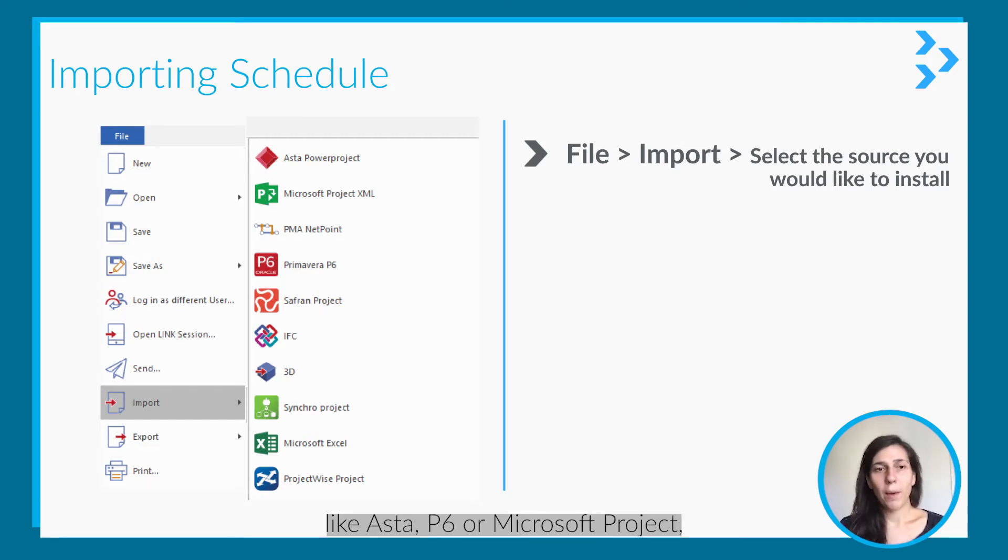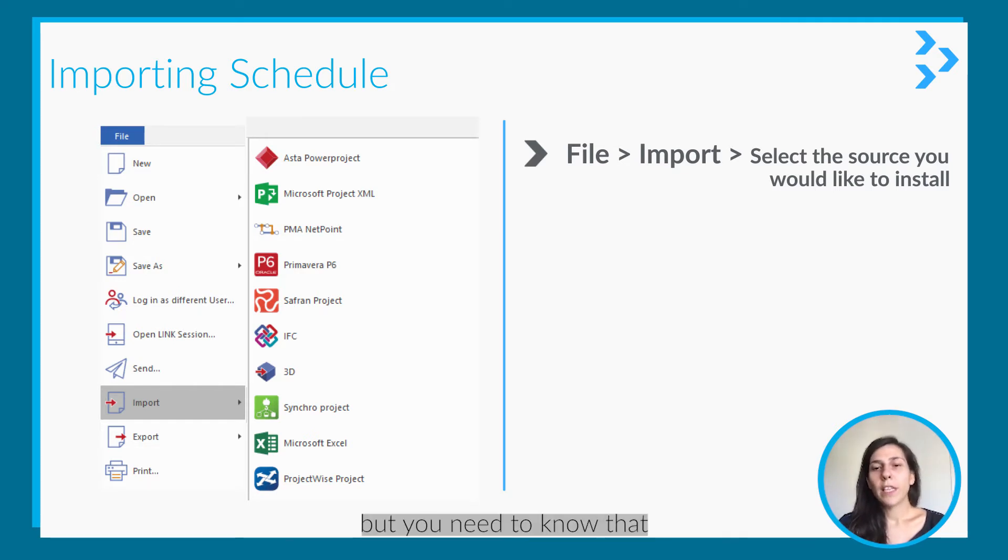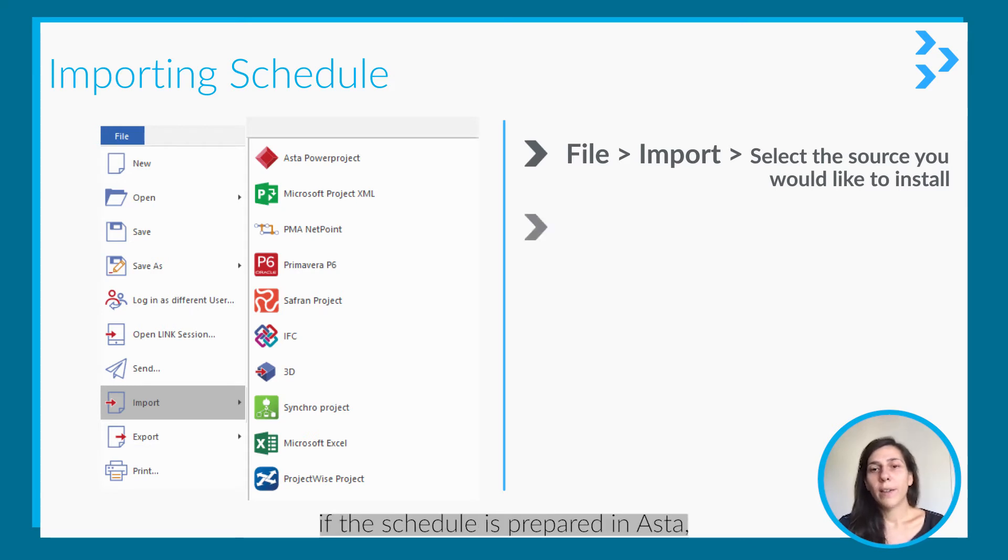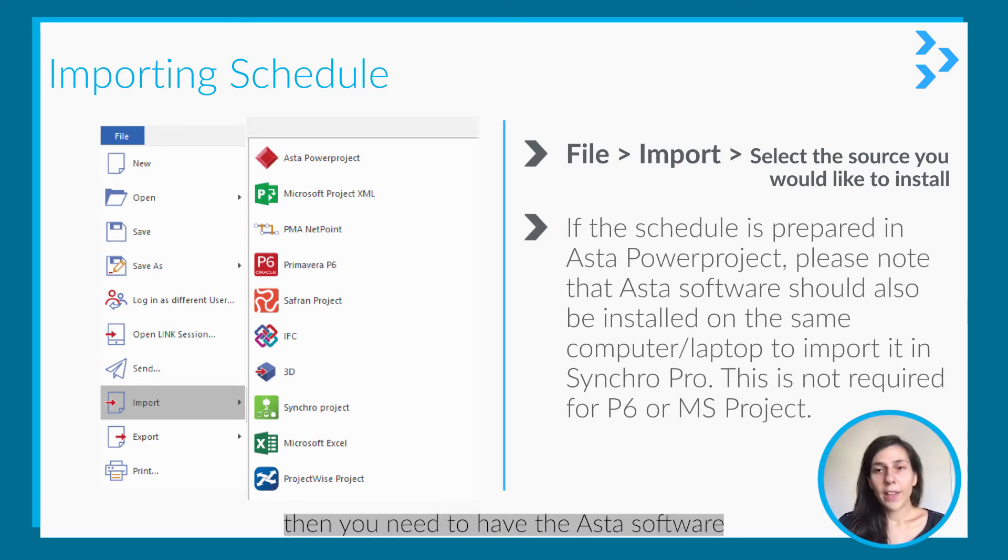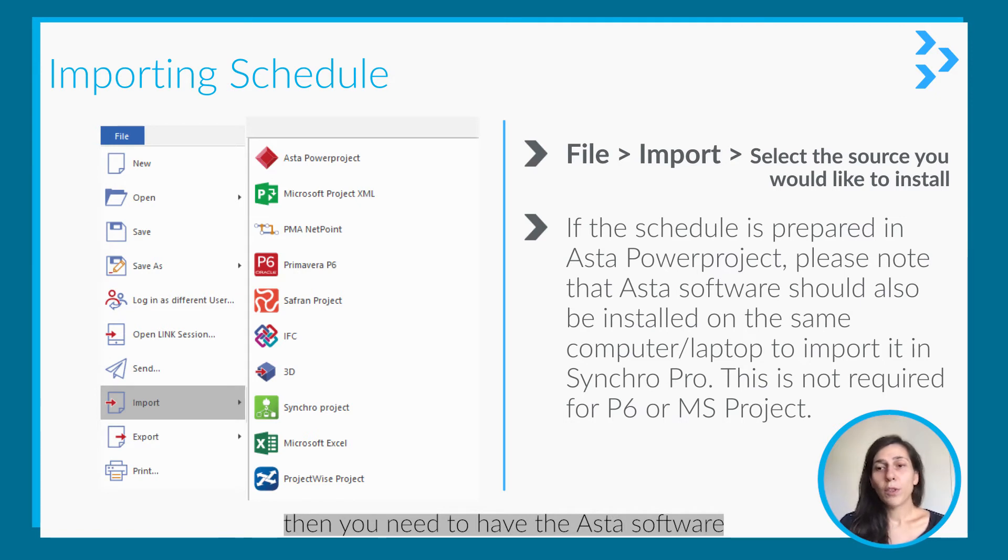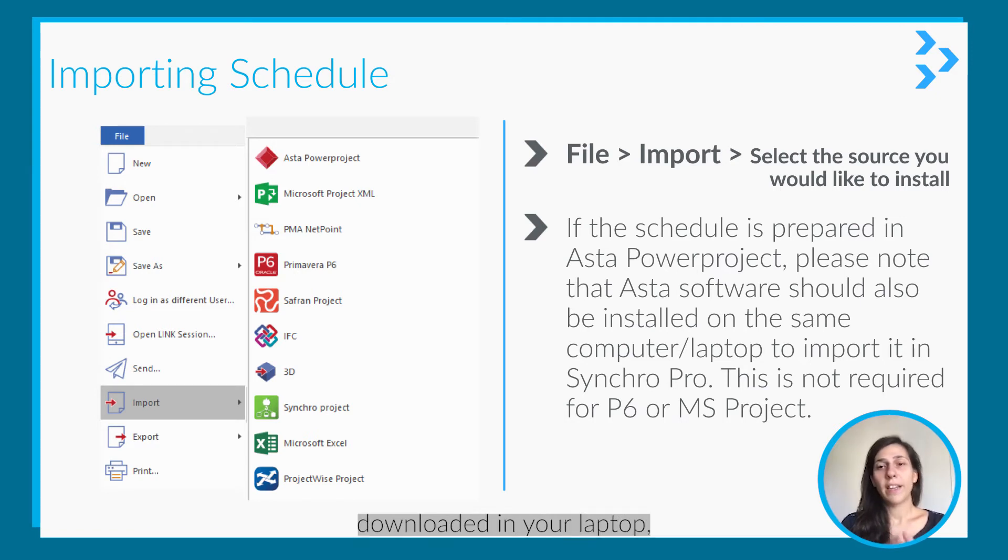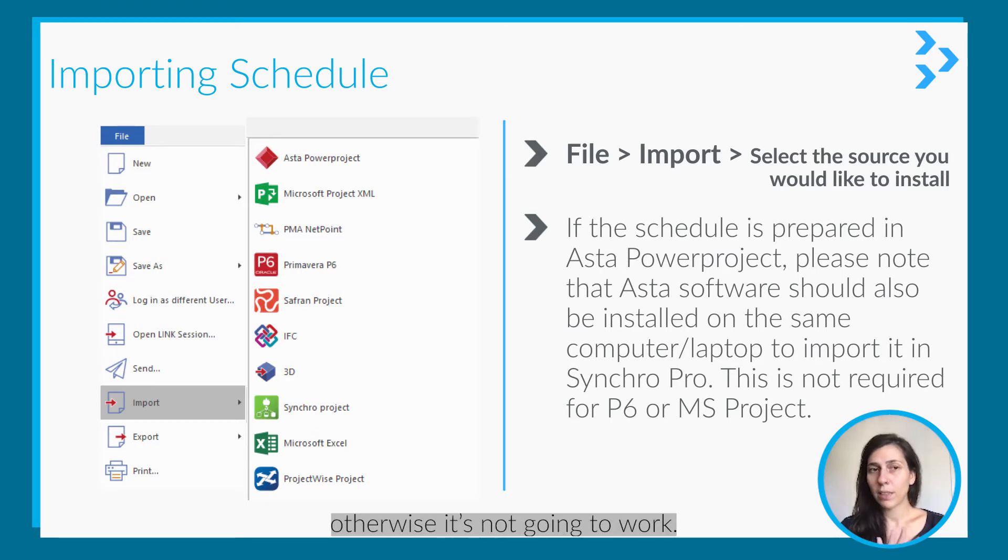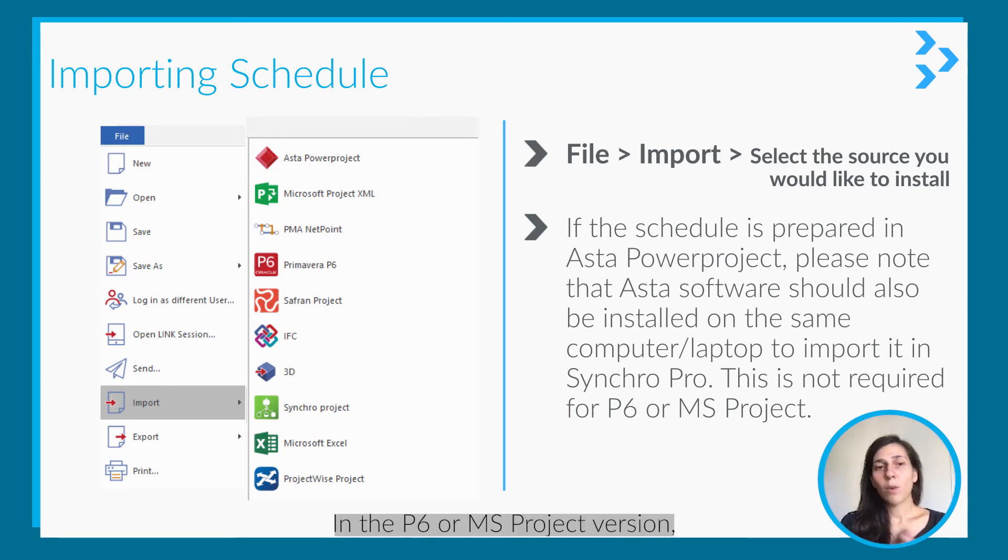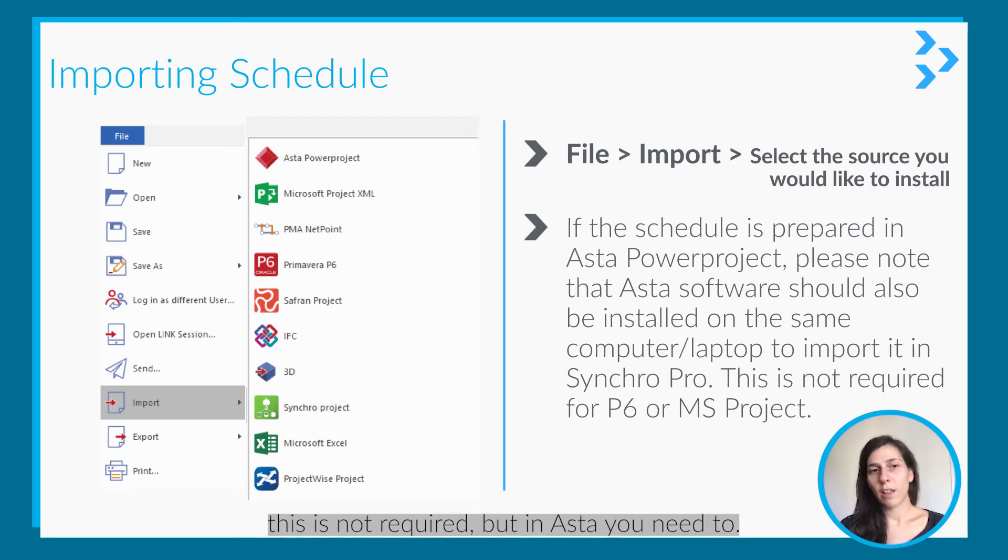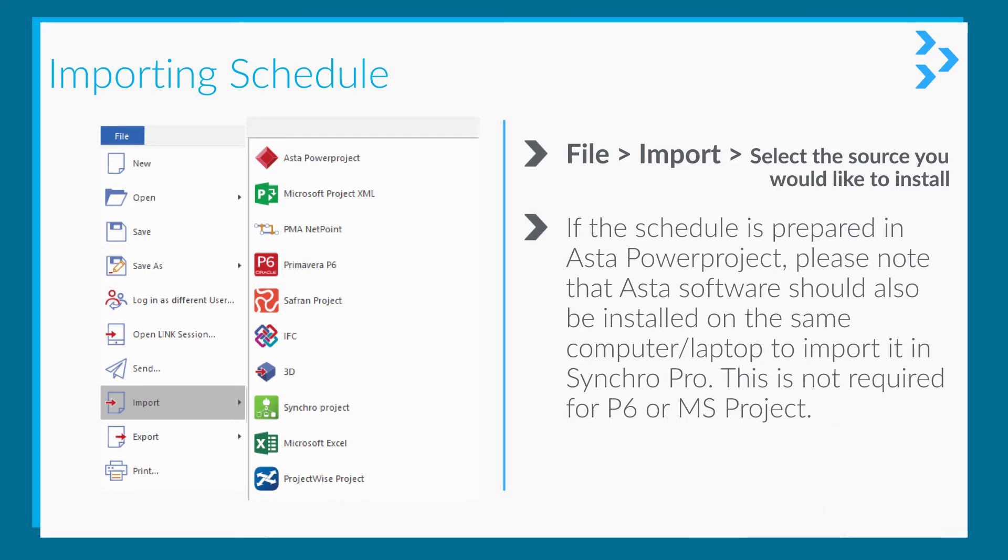P6, or Microsoft Project. But here you need to know that if the schedule is prepared in Asta, then you need to have the Asta software downloaded on your laptop. Otherwise it's not going to work. In P6 or MS Project, this is not required, but in Asta you need to know that.